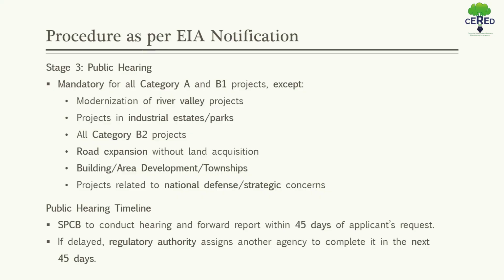And if the public hearing cannot be conducted by the SPCB in any case, then within 45 days the regulatory authority shall engage another public agency to complete the same within 45 days. So what we see is that it is compulsory whether the SPCB is involved or not.